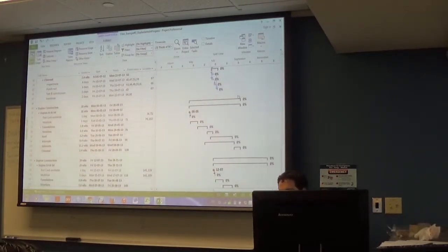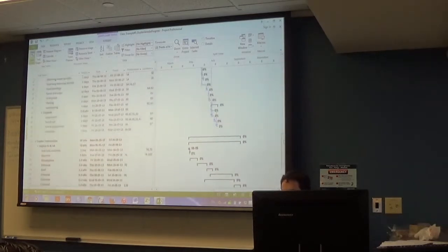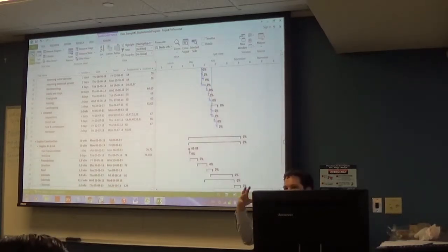So he's determined that once the foundations are certain, maybe Dustin could shed some more light on this. It's my understanding he's trying to move his guys, who are focused on one specific task, and just keep them employed, right? So he's just moving them across the site. He'll have the foundations put in on the first one, and then he wants to move them to the second. The problem here is that the sales aren't keeping up with the progress of the way he wants to build them, so he's basically stalled. His guys can't move on to the next project even though he has them allocated down here to the remaining duplex. Does that make sense?